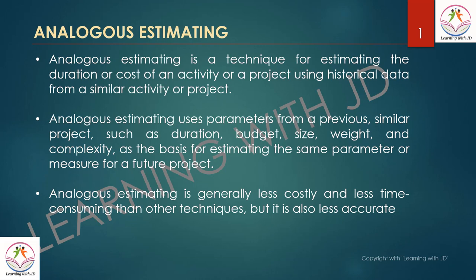Let's see the first one: analogous estimation. Generally when you are working on a project, sometimes you have a shorter duration of time for planning. In that case your manager may come to you and say, 'How long will this activity or project take?' What you do is you look at historical information — whether a similar project or activity was done previously — and you analyze on that basis.